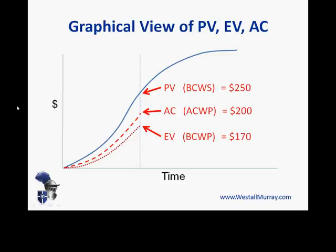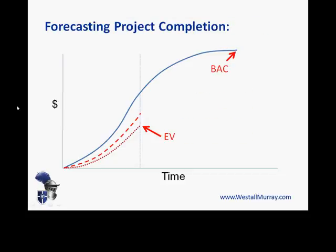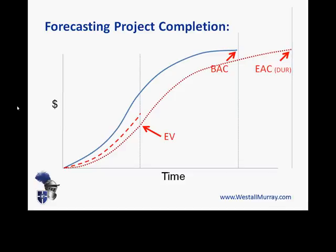As a reminder, we looked at how we can derive planned value, actual costs and earned value. What we're going to do now is look at that original plan for the end of the project — our planned value for the end of the project, also known as the budget at completion — and see what happens if we project forward our earned value. We'll see that if we carry on with a similar trajectory, our estimate at completion for duration, our forecast for the duration of the project, is going to be longer than the original end date.